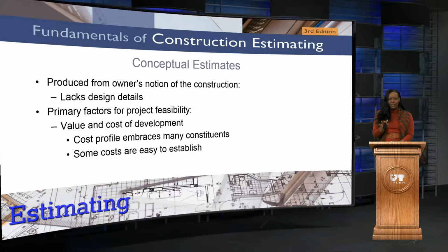Just a few things before we go forward. A really well-developed conceptual estimate is typically based off of historical information. Most companies have information that they have documented over the years. They have projects that they've worked on that are very similar, so they keep that information, and it only makes sense to do that.